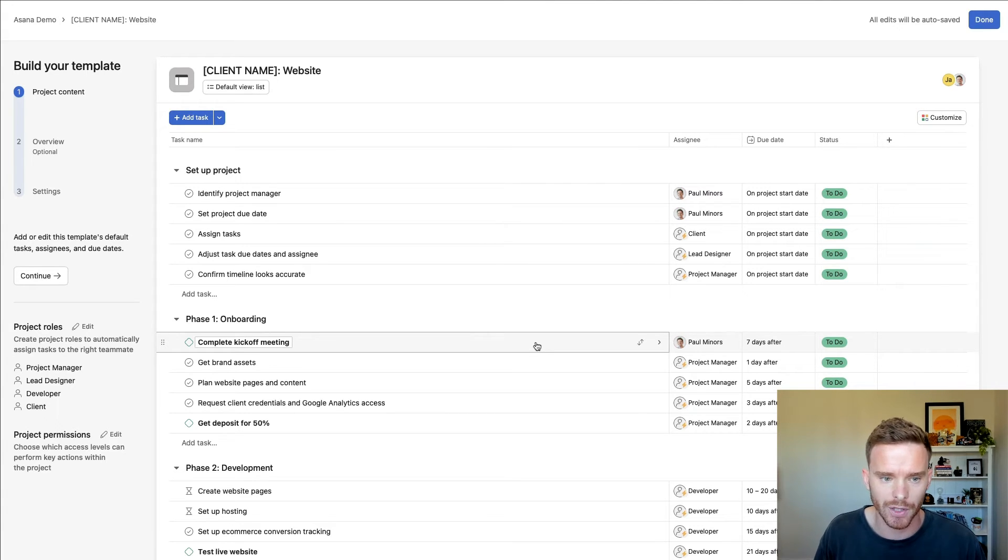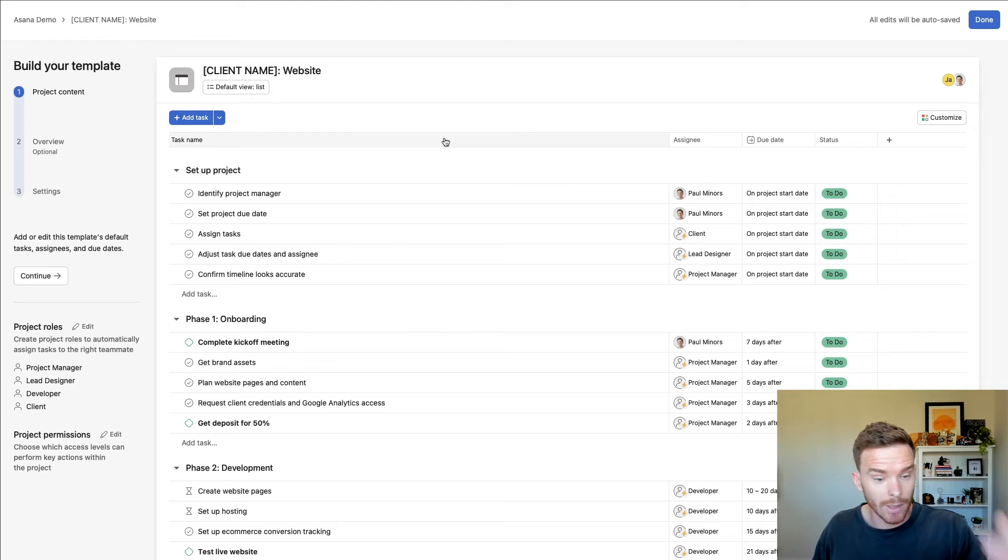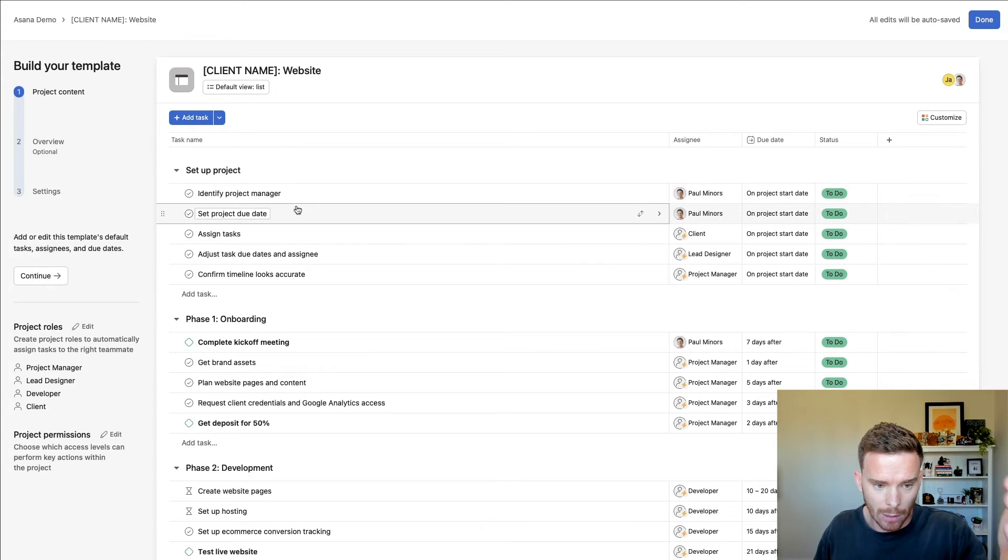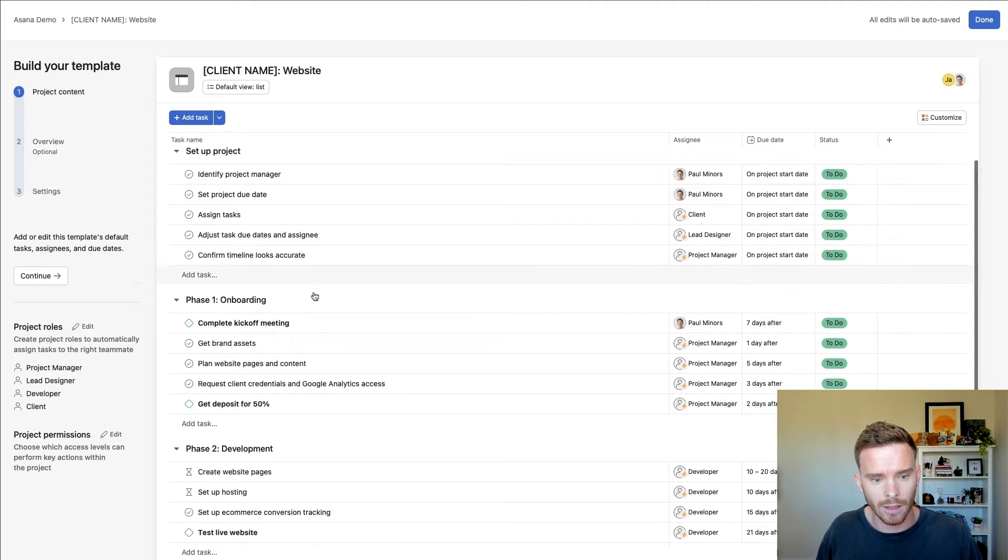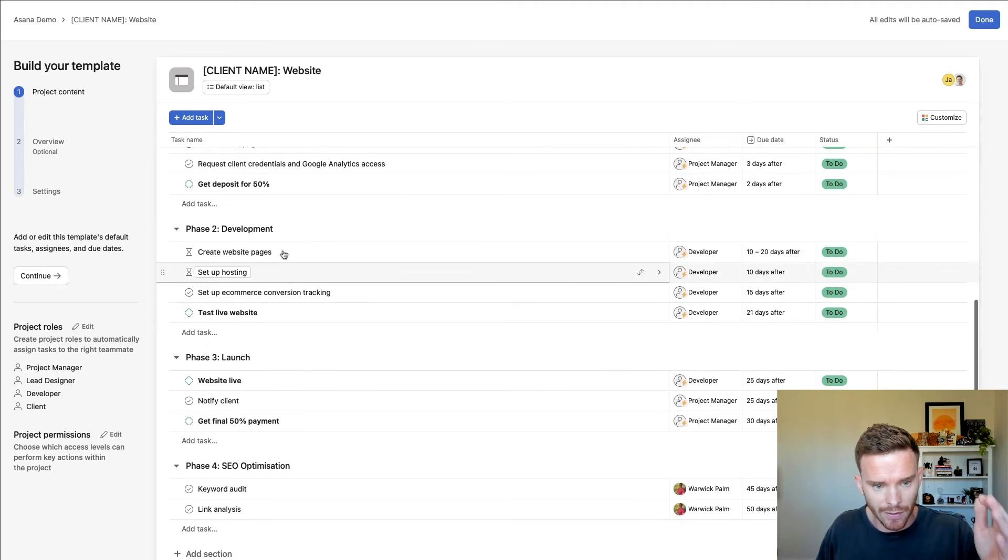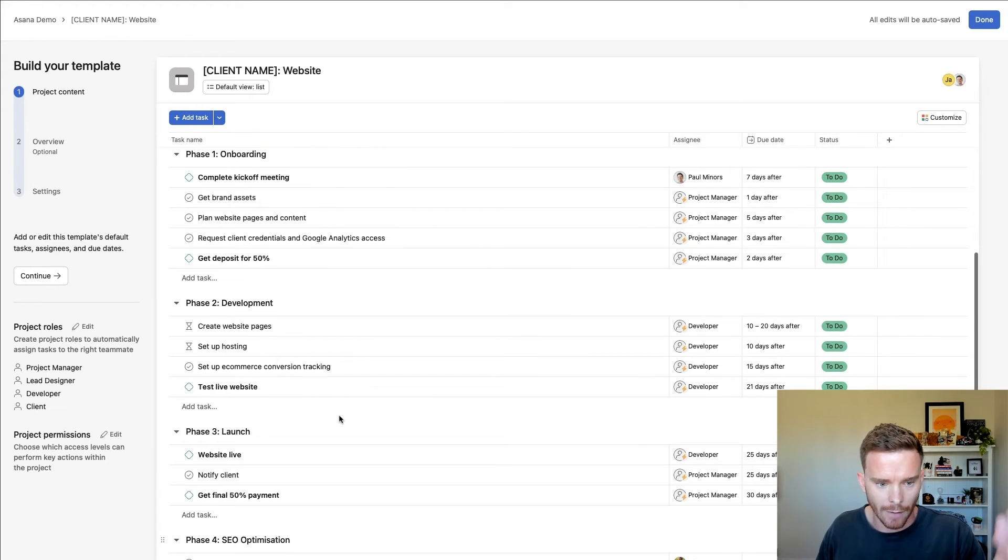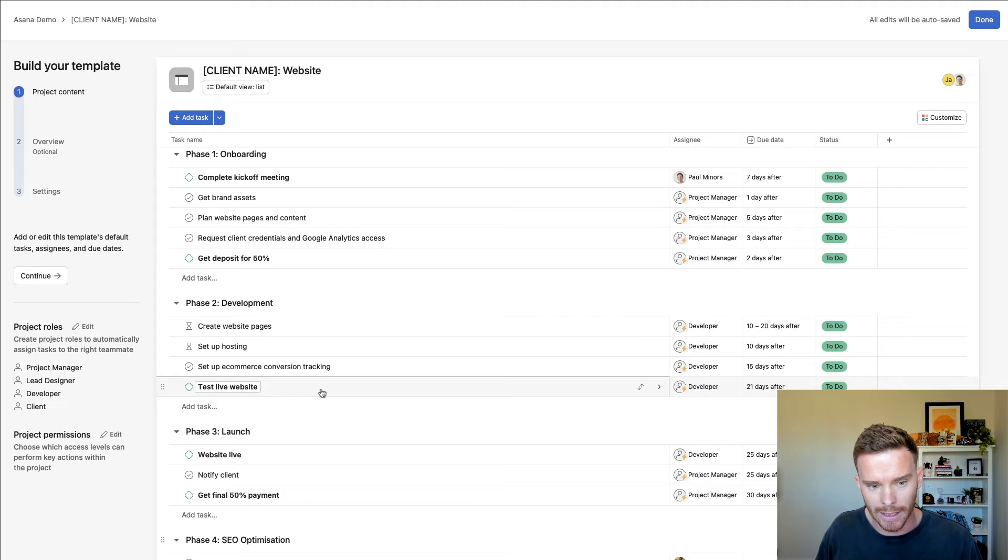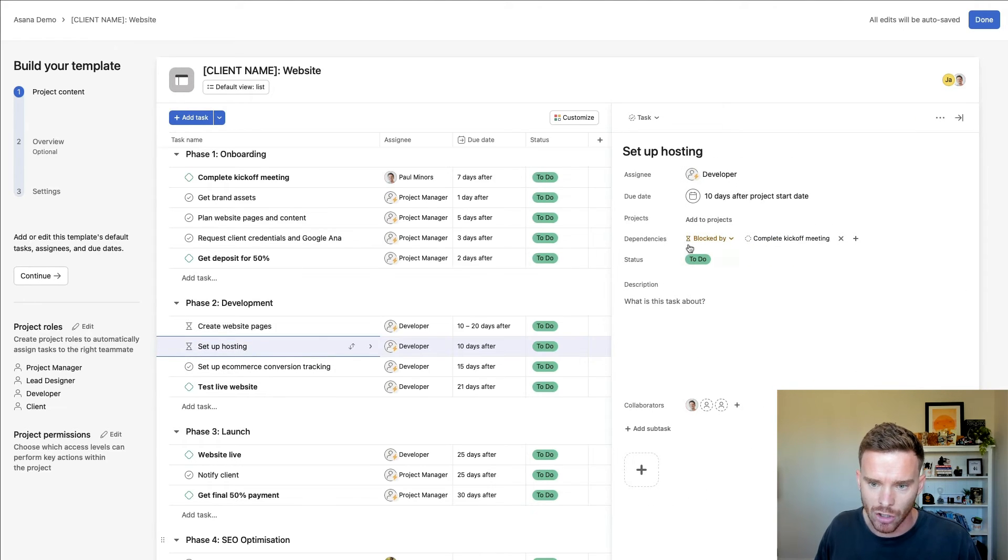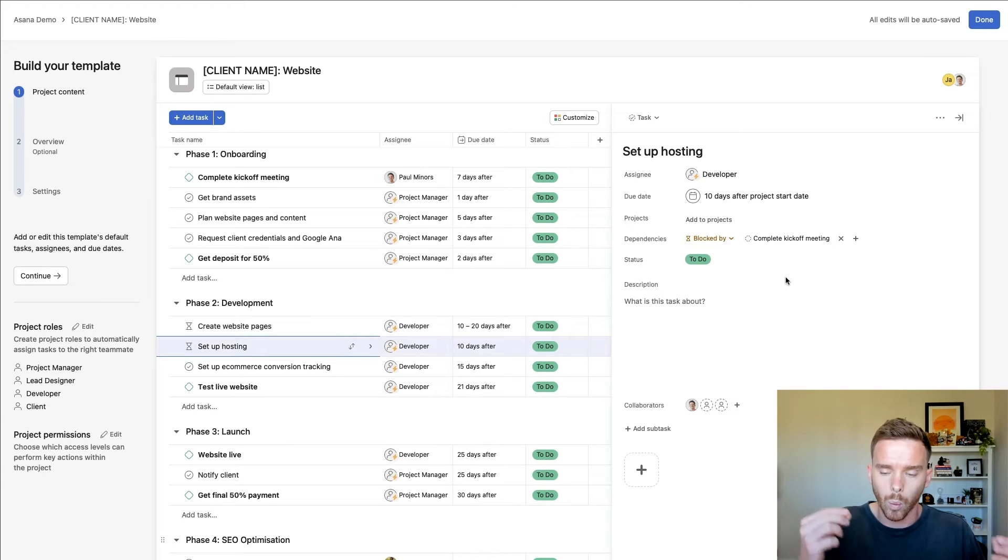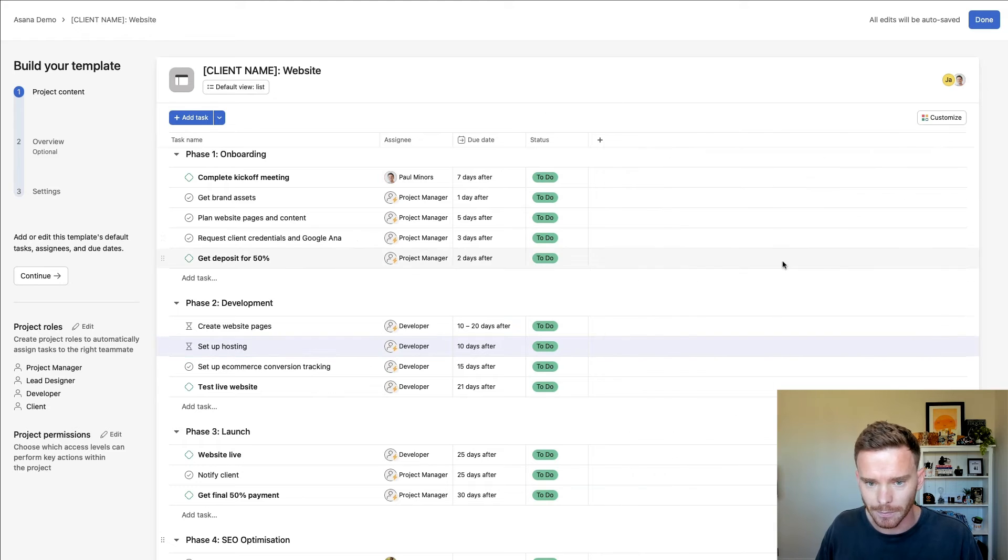similar to my other example, I've got sections for outlining tasks that we need to do to set up the initial project, onboarding the client, developing the website, launching, and then further SEO optimization. I've got tasks and milestones to outline the steps we need to complete. Some of these tasks are actually set up as dependencies, so I can clearly highlight what needs to be done first before we can move on to another task.